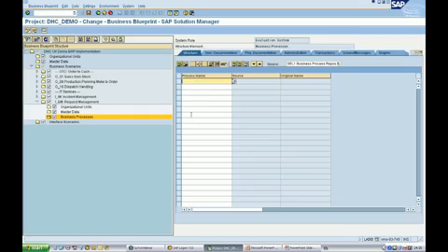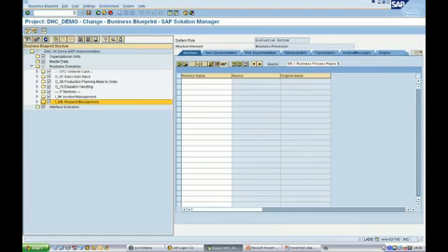And again, for each one of your business processes, you're able to define the process name. You can again copy this in from a given project, from your solution database, or so forth. Once your structure is defined, in the project administration area, you're able to lock the structure to ensure that nobody can change these elements.